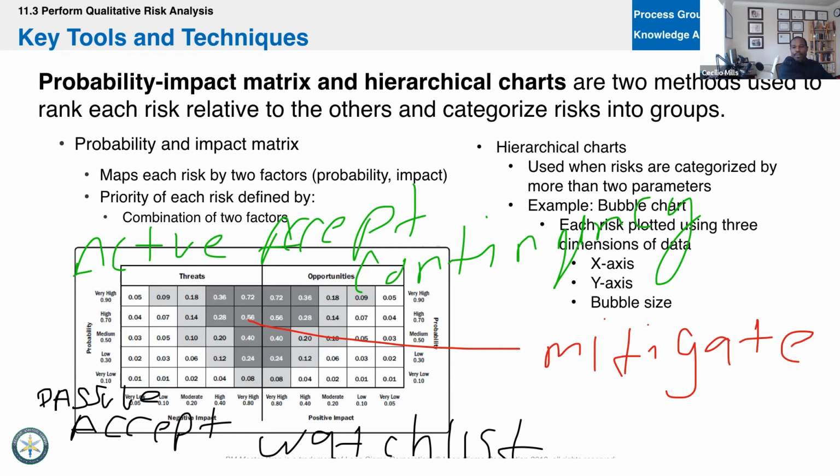And they still end up in the bucket, but there is when it's just like you have contingency reserves. You have just reserves, right? And then you have contingency reserves for the work package. And then you have contingency reserves for the individual activities. And as you keep getting deeper, then you'll see some of those reserves are going to be for just money. If it happens, pay for it. Some of those reserves are actually going to be used immediately to conduct activities to minimize the probability and or the impact of the risk. Does that make sense? It's like we're peeling the layers of the onion back.